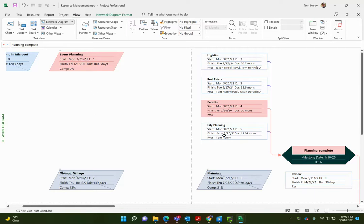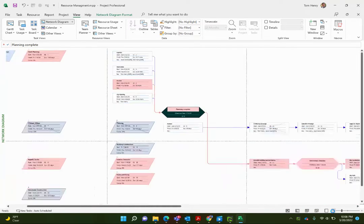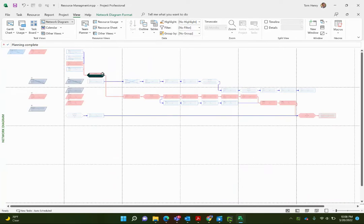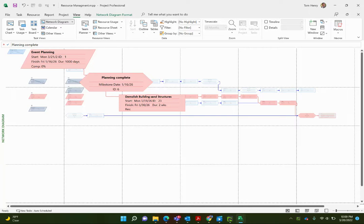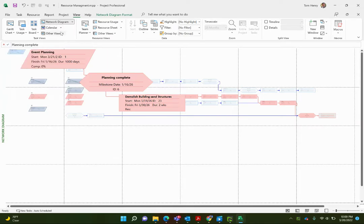Let's take a look at some of the less common views. The network diagram is pretty cool — you can zoom out and see a network diagram of your project and the paths of tasks through it. The diamonds are your milestone tasks, the rectangles are your regular tasks, and the parallelograms are your summary tasks. Red ones are critical and blue ones are non-critical from a critical path standpoint.